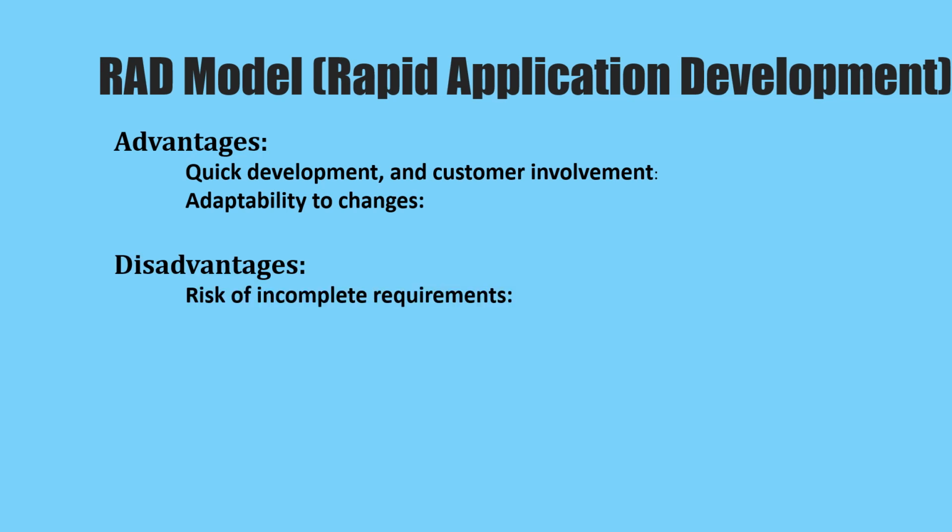Disadvantages: risk of incomplete requirements. The rapid development phase may result in incomplete requirements or inadequate understanding of user needs. Potential for scope creep. Continuous addition of new features and functionality may lead to scope creep, causing project delays and increased cost.